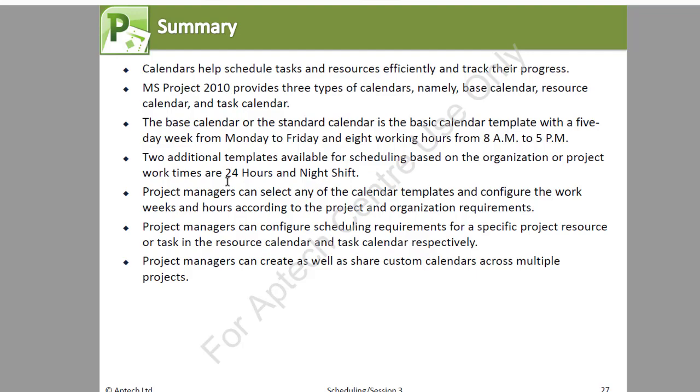and 8 working hours from 8 a.m. to 5 p.m. Two additional templates available for scheduling based on organization or project work times are 24-hour and night shift. Project managers can specify any of the calendar templates and configure the work weeks and hours according to the project and organization requirements. Project managers can configure scheduling requirements for a specific project resource or task in the resource calendar and task calendar, respectively. Project managers can create as well as share custom calendars across multiple projects.